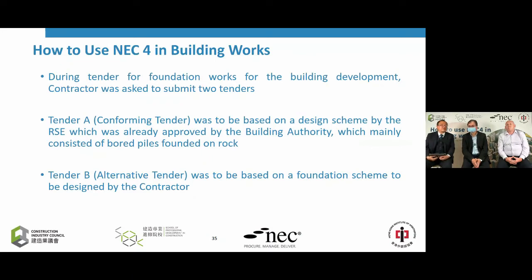In that particular project, the scheme mainly consists of wall piles founded on rock. So I think Wilson is very familiar with that one, because to save time, for a private project, the scheme has to be approved by the building authority. So it is always a practice in the private sector for one conforming design to be designed first and then approved by the building authority.